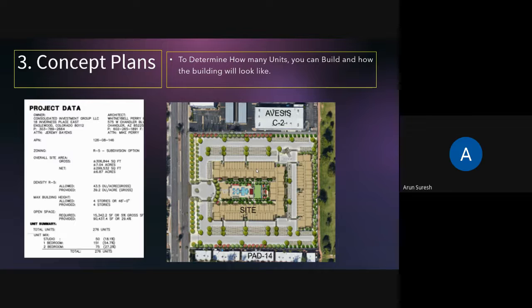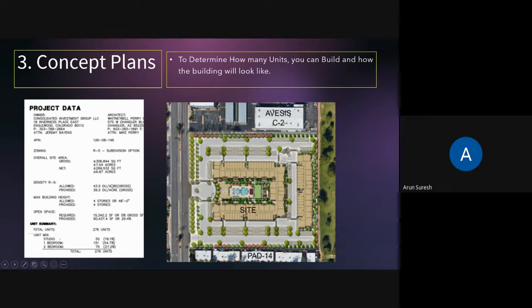As shown on the left, the architect provided instructions that the zoning for this piece of land was R5 — R stands for residential zoning, so it was zoned for building apartments. The land was 7.04 acres. Density is how many apartments you can build per acre. Per the zoning code, you can build 43.5 apartments per acre, and we ended up with 276 units. You also have to look at restrictions like how many stories or floors you can build — there was a four-story limit and 48-foot height maximum. Based on all these metrics, the architect determined we could build 276 apartments.